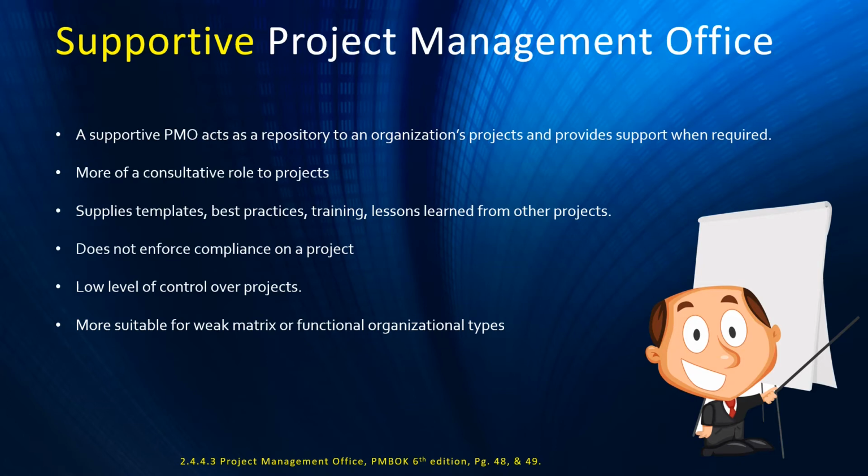As I previously mentioned, they have a very low level of power, and they do not enforce compliance with any methodologies of the project or anything regarding how the project should be driven or delivered. And this type of PMO is mainly suitable for weak functional organizational types.